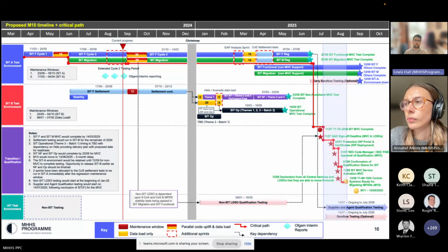And looking at the spread of all of the responses that we got back from each individual SIT cohort and how they approached that exercise, understanding some of the underpinning assumptions, and also the test points required per sprint to meet those trajectories, this is where the model that we felt most comfortable with came out. So I guess, Angelos, if yourselves and your team are able to go faster and get SIT done, as I mentioned, we'll do everything to support that and to be done quicker. But at the moment, given all of the data that we had, looking at the trends sprint on sprint and what's ahead of us, we felt that a 5-month delay to SIT functional and migration was the most appropriate window.